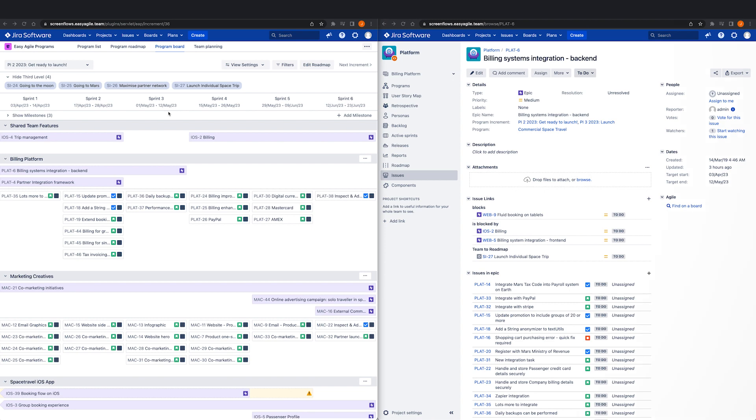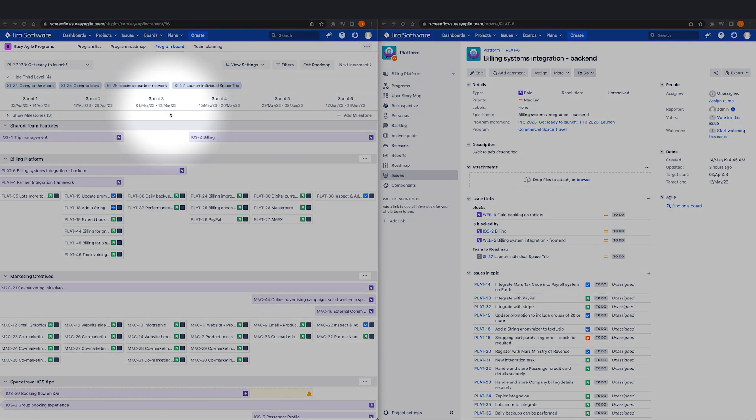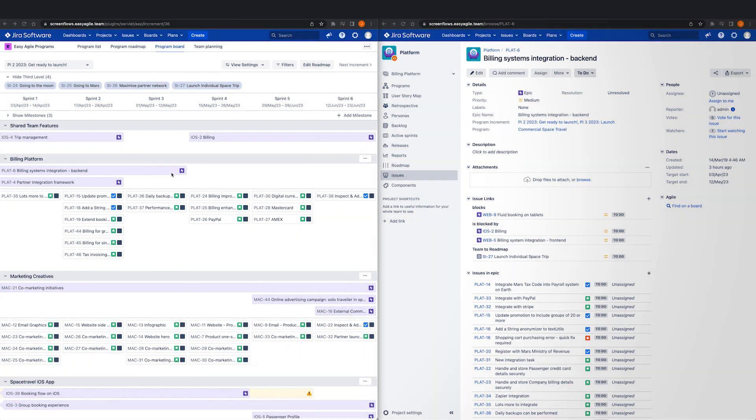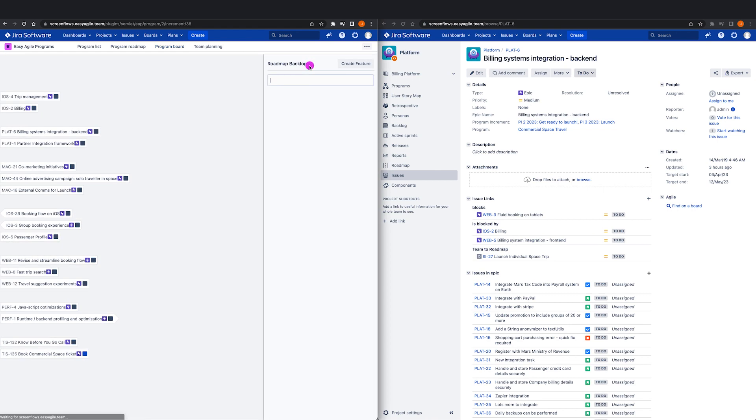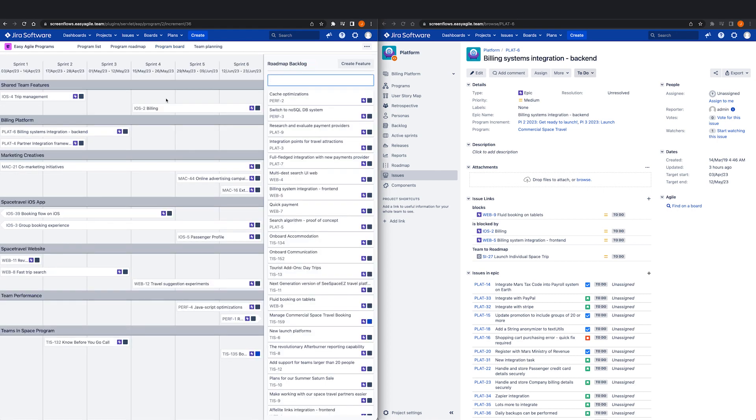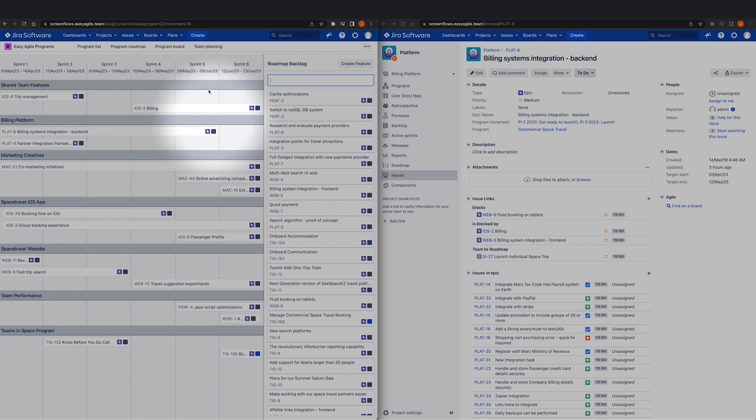The plan created for the quarter, during PI planning or otherwise, then becomes the single source of truth throughout execution as well. When features need to be rescheduled to address any blockers or conflicts, these will be auto-populated on your roadmap and auto-updated, meaning less manual work for the manager of your program or release train engineer.